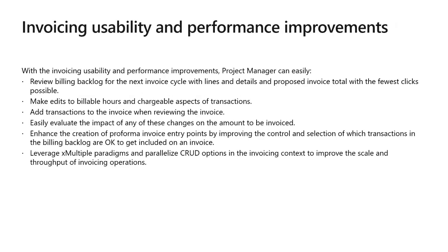It is common for project-based companies to create an invoice for a large team that is working on a project that has recurring lifespan. Each invoicing period can involve thousands of transactions across time, expense, and material usage activity for projects that will need to be reviewed and confirmed before generating a customer-facing invoice. This process of reviewing is an essential function to ensure a quick invoice and maintain healthy operational metrics.